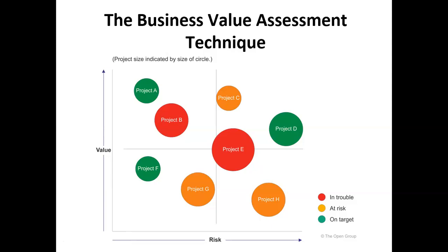And also the volume of the change, basically the number of customers it impacts. All those things can be considered for assessing the value or prioritizing the functionalities. Financial contribution could be part of it, strategic alignment, compliance to principles. So many things for value. Similarly, for risk, that could include the impact of failure, organizational capacity, all those things. Got it? Agree. Now, have a look at this one.